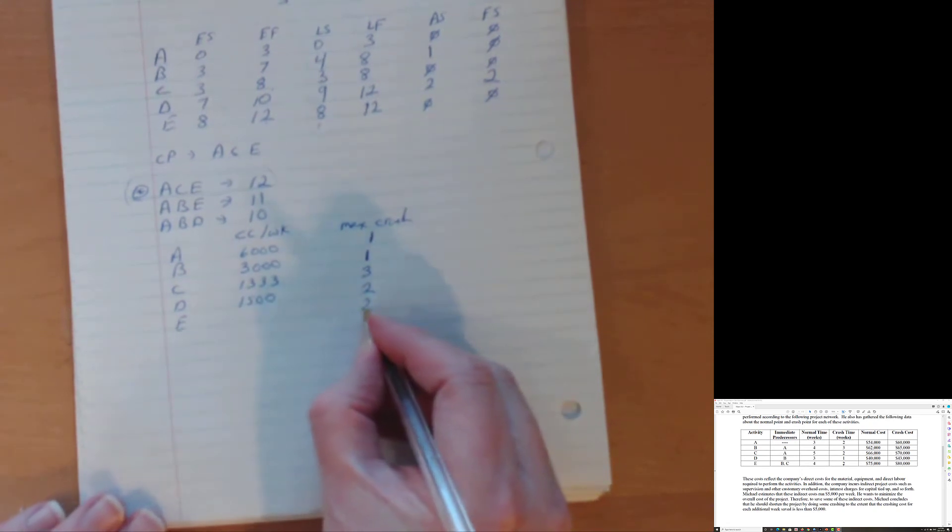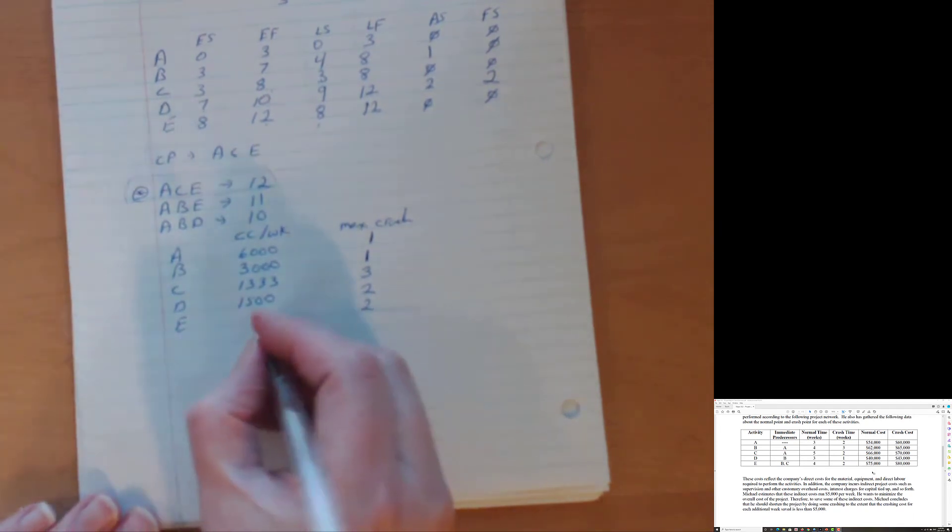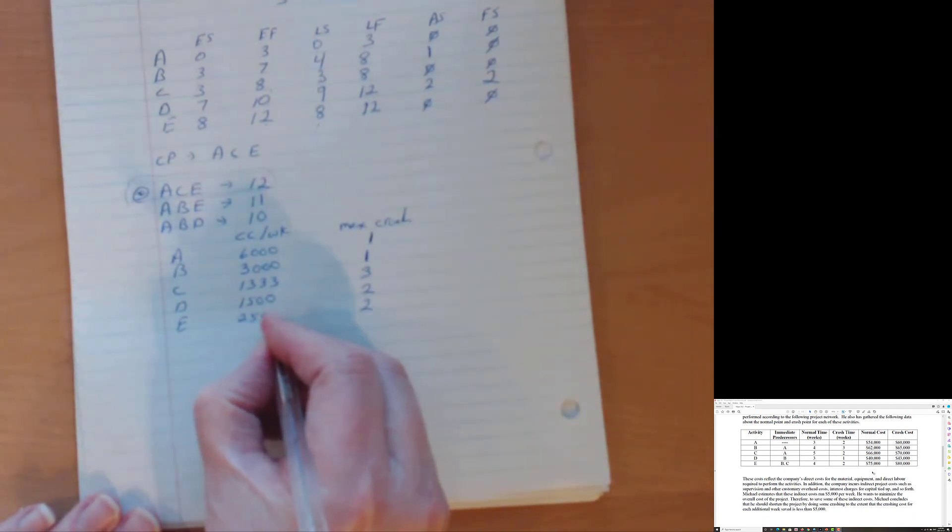Last one is E. E can be crashed for a total of two weeks from four weeks to two weeks. So we crash a total of two weeks and it costs us to crash those two weeks. It costs us 80,000 minus 75,000 or total of $5,000 to crash for two weeks. How much to crash for one week? 5,000 divided by two and we get 2,500. So we've set out our whole entire table here. And so we've got that. We've got a critical path. Now we're set to go.